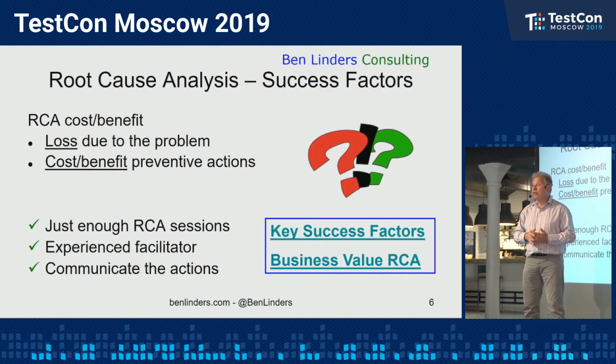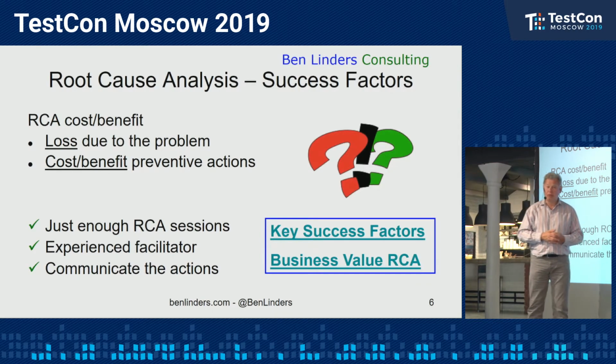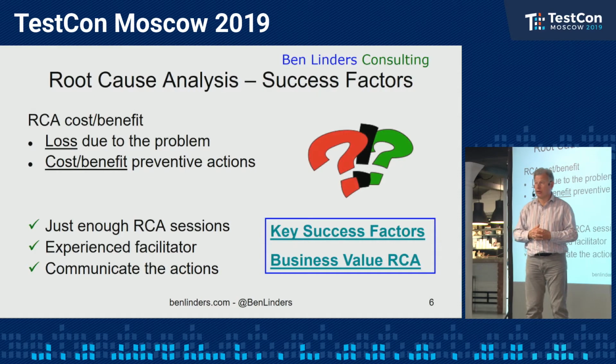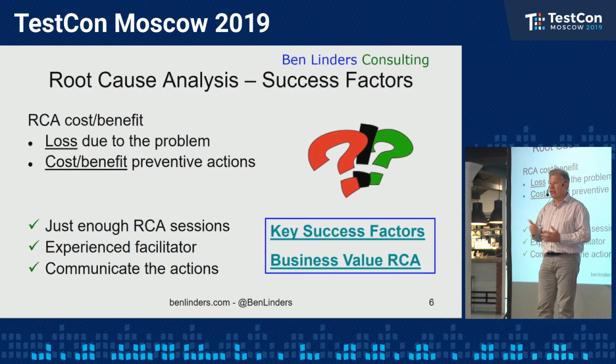And once you have these two figures, then you can take a decision whether it's worthwhile to analyze this or not. And believe me, I had people coming into a root cause analysis with a problem, and when we discussed the loss, they said, well, we actually lost 5 minutes, it wasn't that big a problem. Okay, so why are we investigating this? Spend your time, spend your money on the really important problems. Focus on the ones where you had a big loss and where you really want to take some action. That's also what I stated there with just enough root cause analysis sessions.